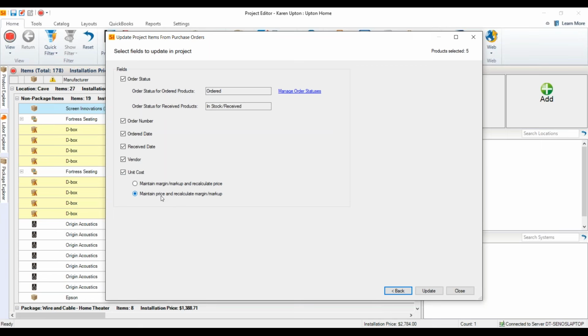And now here's your option down here for that unit cost, because as you're talking back and forth to a vendor and dealing with purchase orders, like I said, maybe the example was, hey, the cost is wrong, so you change the cost. But, well, wait a minute. If that came from a project, my cost in this project was the original one I put on that purchase order. So if you're going to update that cost within a project, you might want to stop at this point and make a revision. So you have a change order here, even if it's an internal change order. Up to you on that, or you may not update the unit cost at all. Be like, nope, that's how this project went out. That's what it's going as.